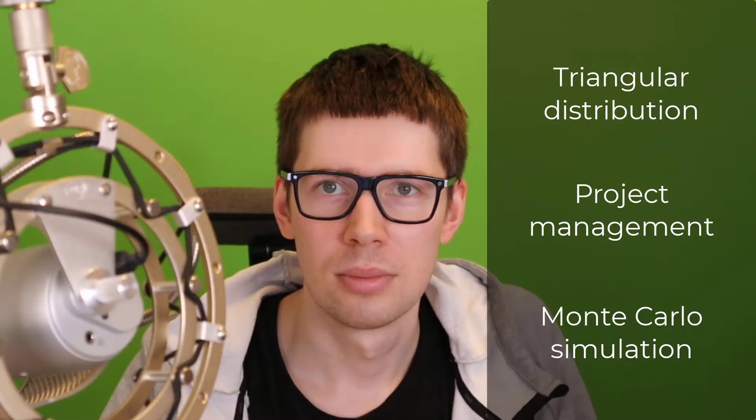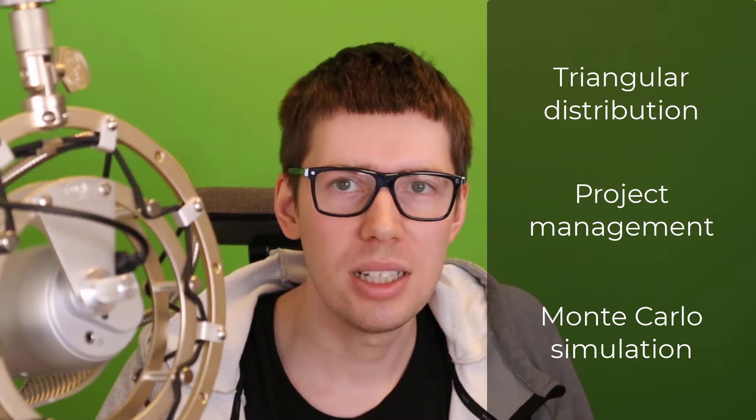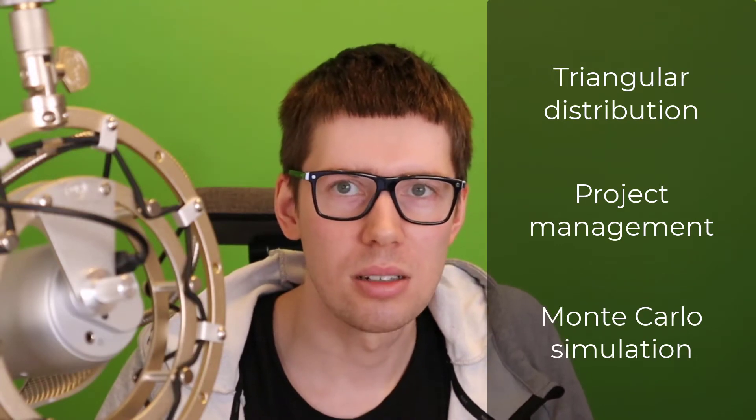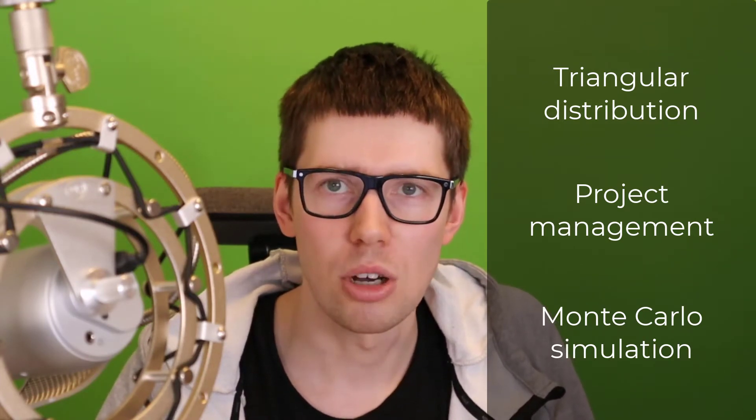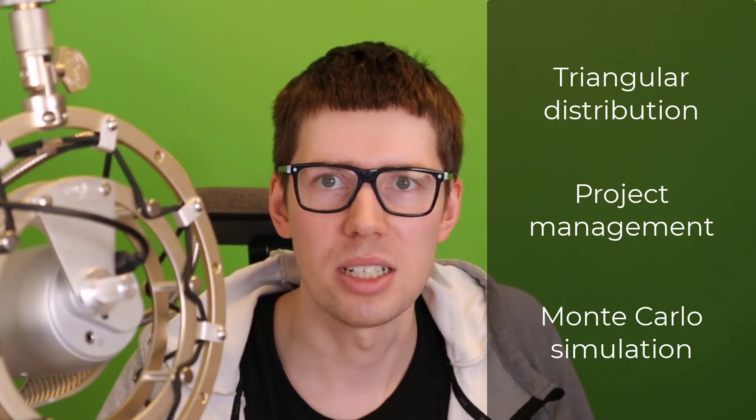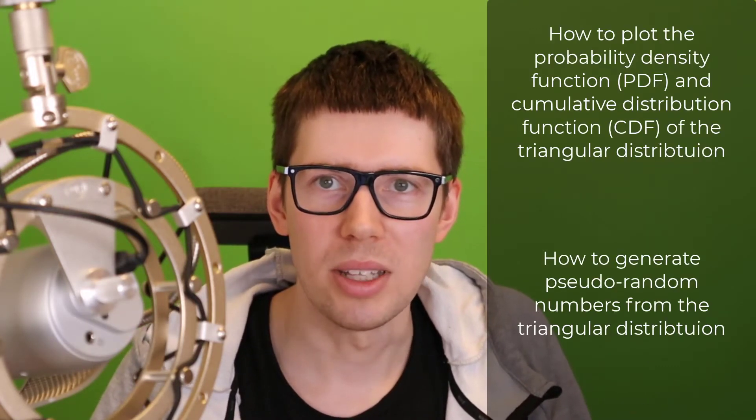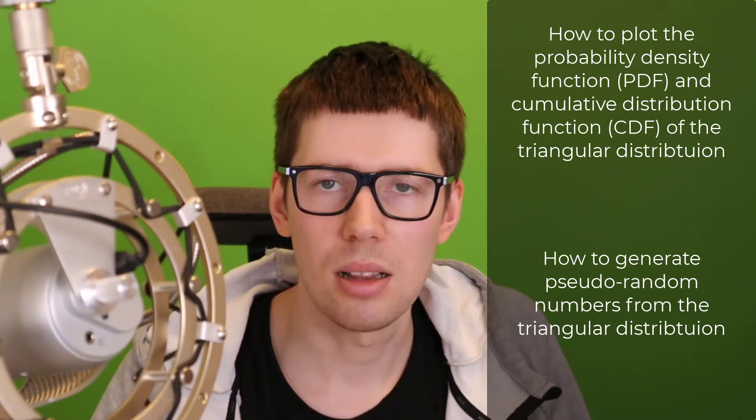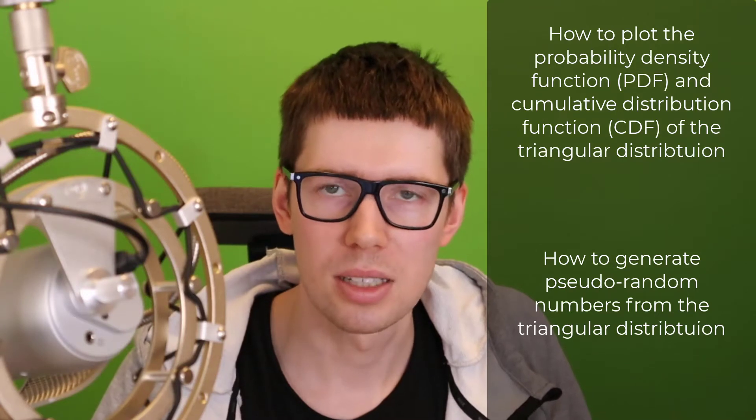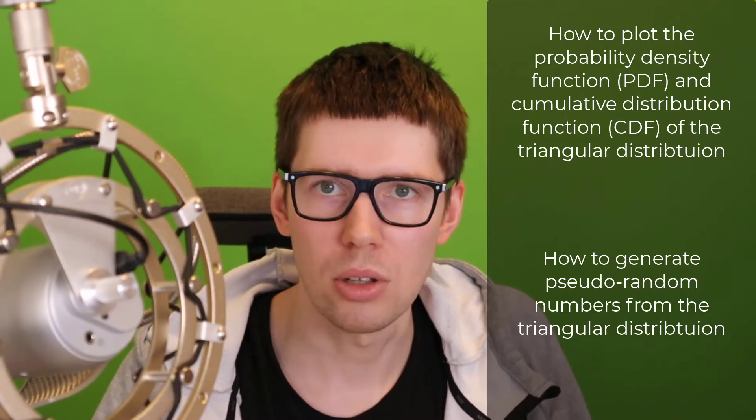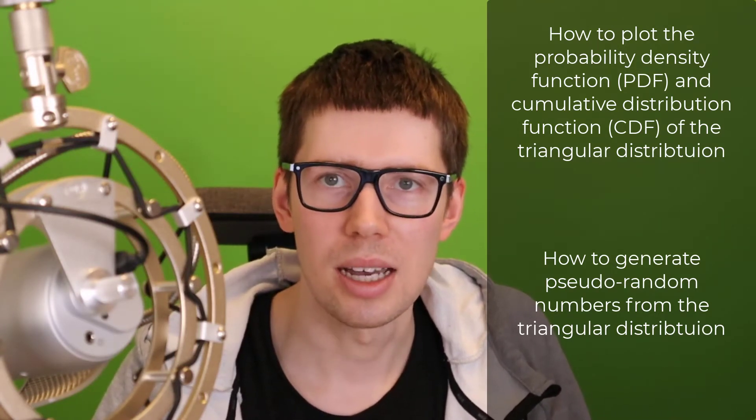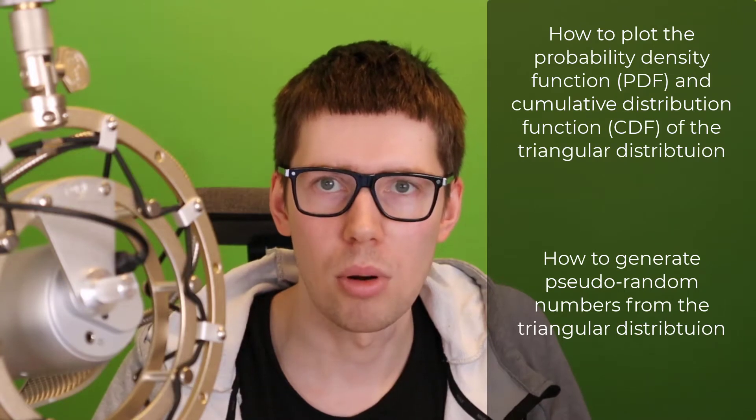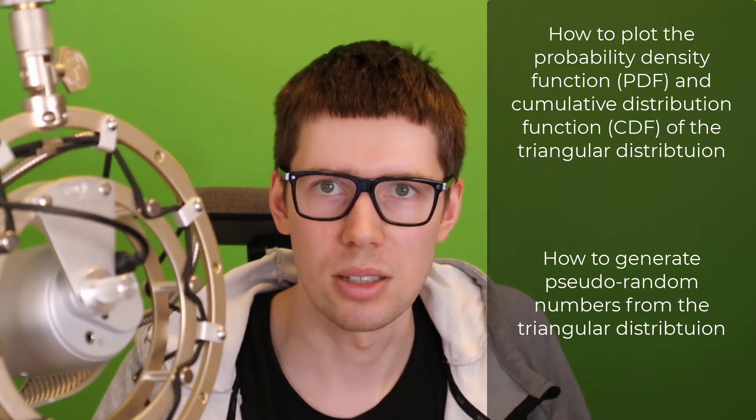Let's talk about triangular distributions. The triangular distribution is one of the most commonly used statistical distributions within project management when it comes to conducting Monte Carlo simulations. So if we want to implement this in Excel, we need to know two different things. First, how do we plot the triangular distribution, and how do we draw random numbers from this statistical distribution?